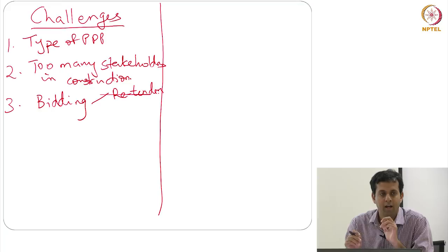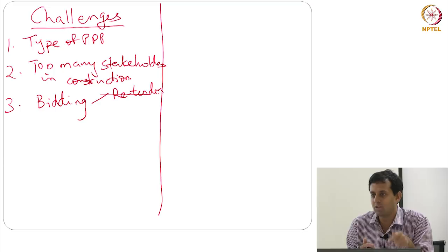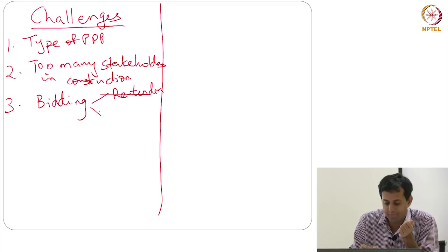So it's almost as if you are turning things around after you've made a selection, and indeed, I think there was at least one candidate who in the original regime had been selected. But when this new committee came in and rejigged the evaluations, they fell off the radar. And so the transparency in the bidding process is something that we need to think about. Also, when selecting consultants, they had a little bit of retender. So the one was retendering. The second one was, of course, the court case,